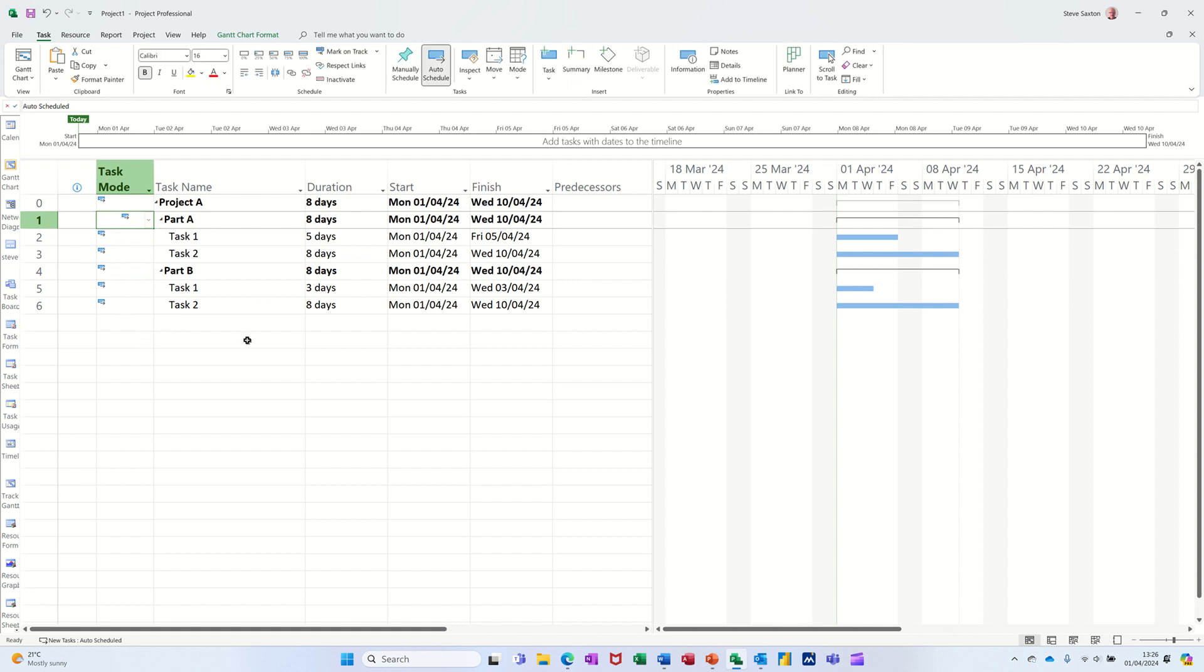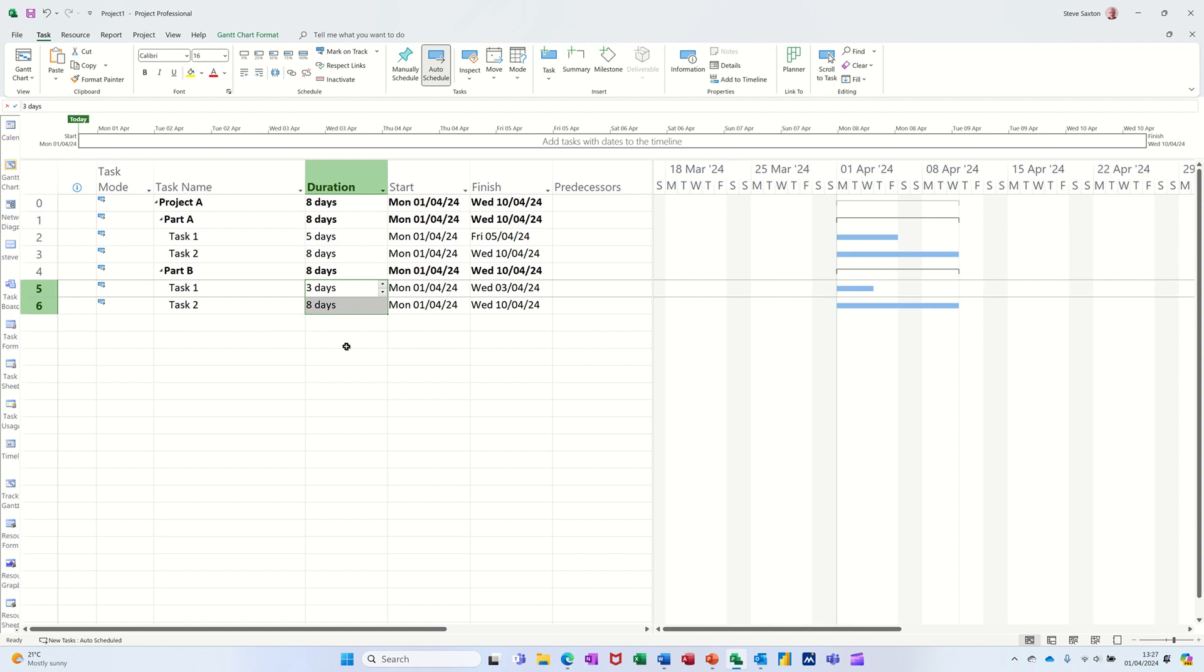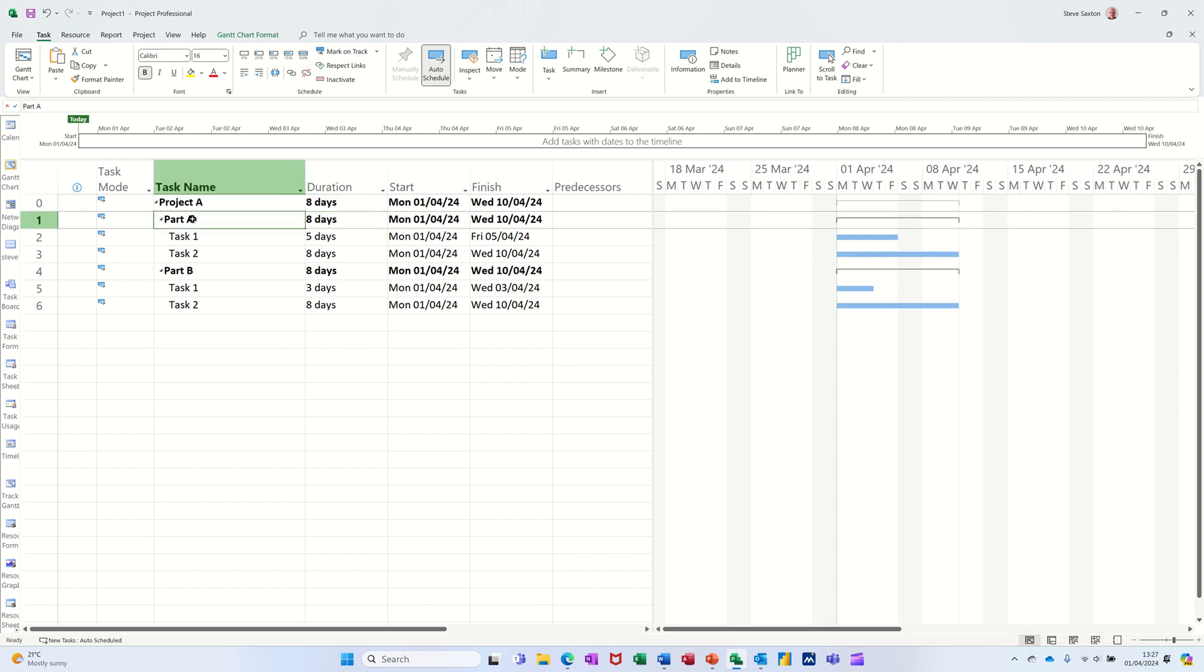All the task modes are now on automatic, all the red lines have disappeared, all the summary tasks are picking up the durations from underneath them. The project summary task hasn't really been affected by any of that so that was okay, but these ones that you do either from the task tab on the ribbon here or you do the indent, same place, for those you need to be careful of.